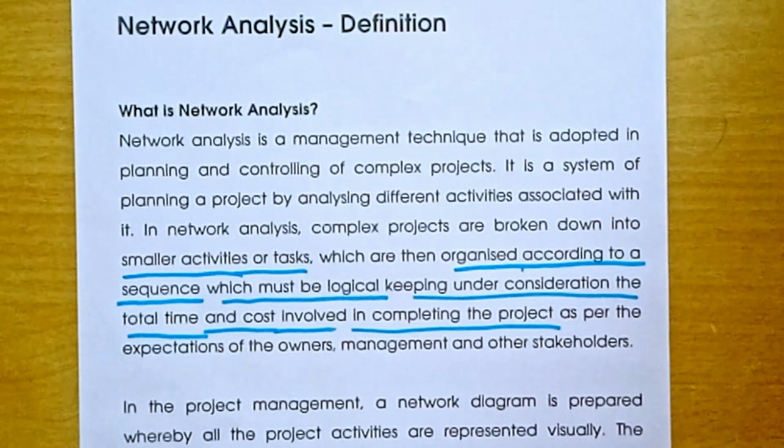And second, according to the plan, you order materials, you order labor to carry out the work, and you arrange the material and labor. And third, you start laying the foundation of the house. And after the foundation is laid, you start laying the pillars. And after the pillars are laid, you carry out casting of the roof of the house.